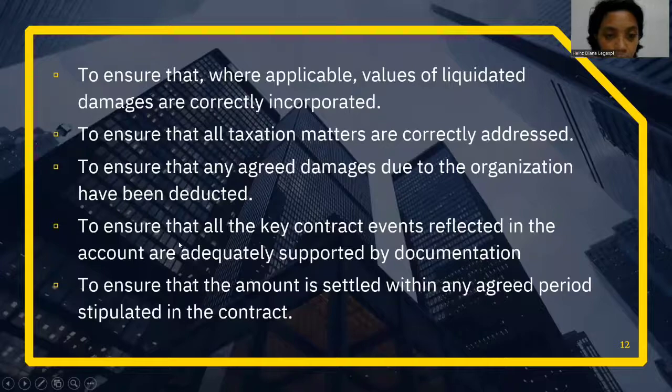Next, ensure that where applicable, values of liquidated damages are correctly incorporated. This is to make sure that the liquidated damage values are accurately incorporated. Next, to ensure that all taxation matters are correctly addressed. This is to guarantee that any tax-related issues are properly handled. Next one, to ensure that any agreed damages due to the organization have been deducted. This is to confirm the deduction of any agreed upon damages owed to the organization.